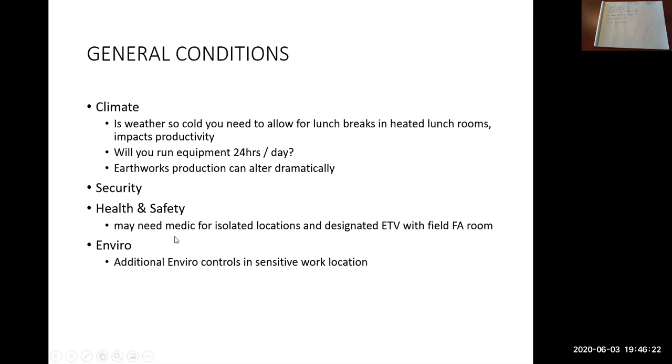Depending on the number of people in your crew, you may need a higher first aid level. So, you know, maybe a level 1 doesn't cut it. Maybe you need level 2, level 3, etc. And of course, it costs more to put a person through that course. So the higher the level of first aid that they have, the more money it costs to put them through those courses.